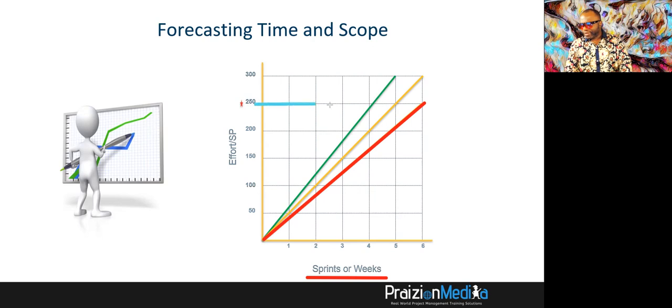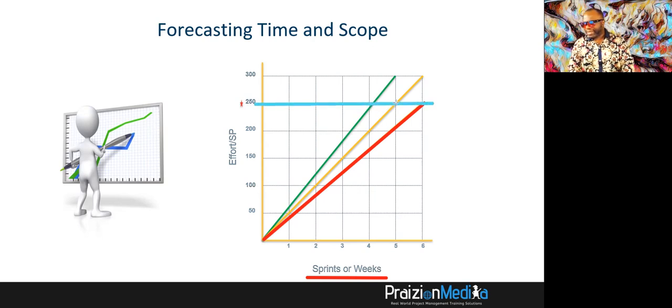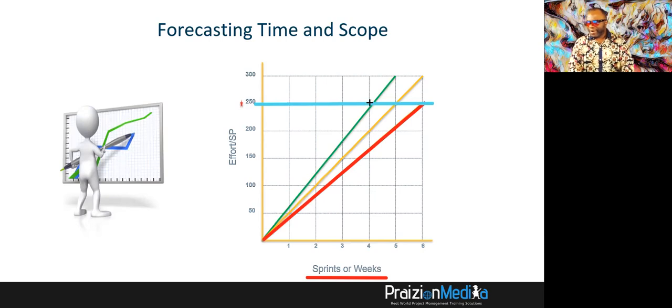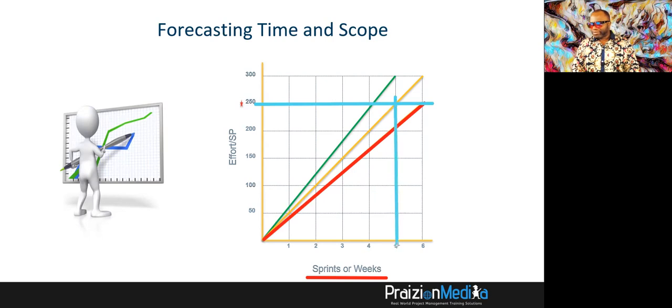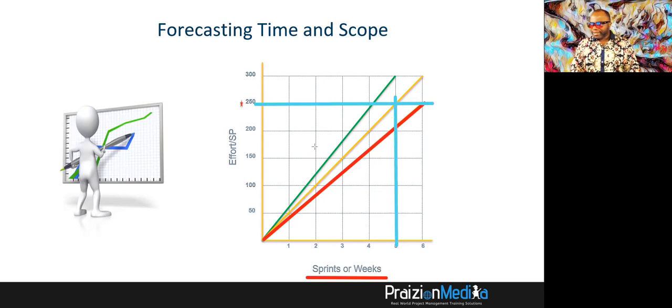And then you can trace from here. This is 250. And you could tell them the best case scenario is around four weeks. But if I was going to give you the line of best fit, it's going to be around five sprints. See that? Five sprints. So within five sprints, I can get you there.